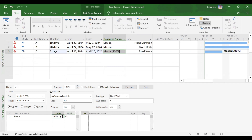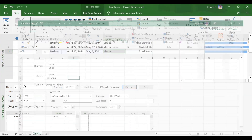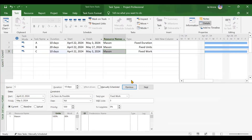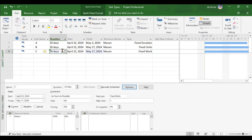Third case for fixed work: increasing duration to 20 days. Units will still be 1, and duration is 20 days, so 20 × 1 would ideally make work 160 hours. But since this is a fixed work activity, nothing will change. Increasing duration to 20 and going back confirms nothing has changed because it is a fixed work type of task.